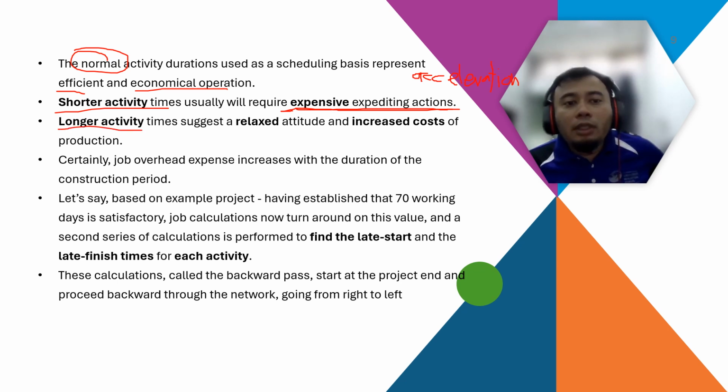And longer activity time suggests a relaxed attitude, but also an increase in production cost because you need to rent machines for longer days. You need to hire labor for a longer period, so the cost will be increased because you are hiring for more days.